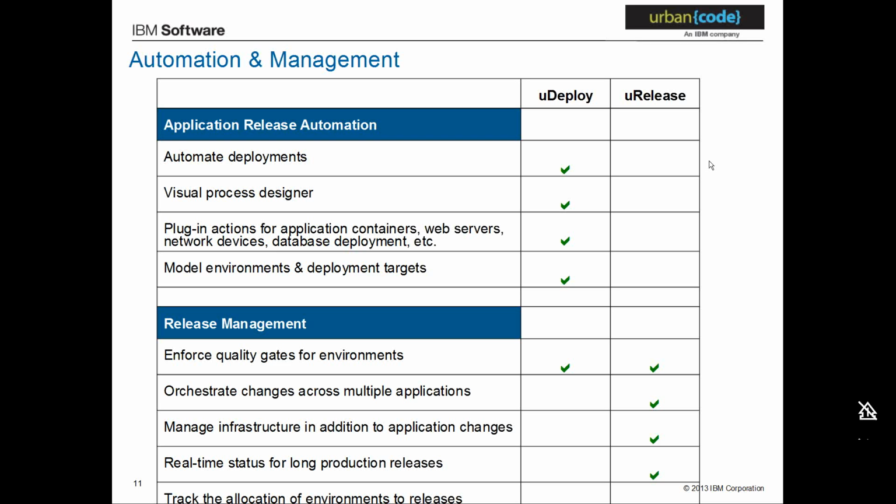So when we talk about releases, one of the important things we need to understand is that it's not only about software. At the end of the day, these softwares need certain hardware, certain resources where they can get deployed. And there's always a gap wherein the hardware is not ready, the OS is not available, or the machine configuration is not available. Also, what are the machines available, and what are the teams who would be working, because for each release there would be a different team. Probably one team would be looking at, let's say, release 1.0 and the other team might be looking at 1.2.